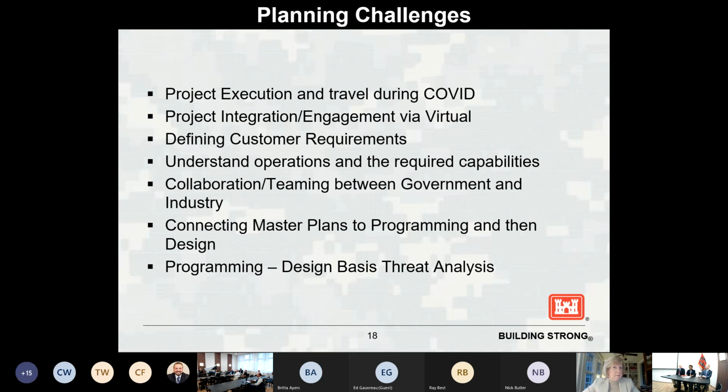And there's been a mix of experiences. Early on, I think the challenge was really getting the customers to be prepared and engaged. So we had to start doing a few more calls prior to the actual charrette to make sure that they're prepared. In some cases, we provide them questionnaires or interview documents prior to the actual charrette, so that they would come with information.